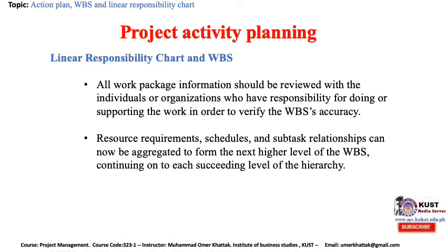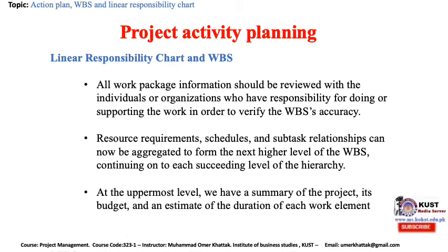Resource requirements, schedules, and subtask relationships can now be aggregated to form the next level of the WBS, continuing on each succeeding level of the hierarchy. At the uppermost level, we have a summary of the project, its budget, and an estimate of the duration of each work element.